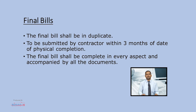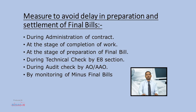Required documents include rent, electricity, taxes, measurement books, abstracts, and requisitions as applicable — either signed copies or certified true copies of all work orders, deviation orders, extension of time, copies of approval of star rates and proportional rates as applicable, copy of completion certificate issued by GE, case 3 justification, escalation calculations, propriety material justification calculations, etc.